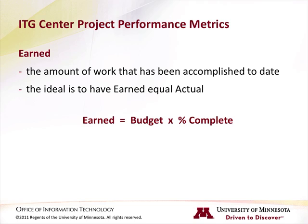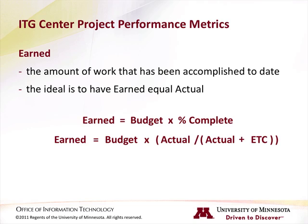Another way to view this calculation is: earned equals budget times actuals divided by actuals plus ETC. Notice the role that the core metrics play in determining the value for earned — budget, actuals, and estimated time to complete all come into play.